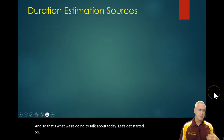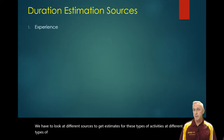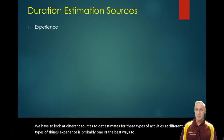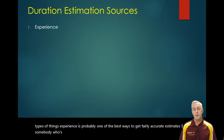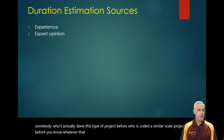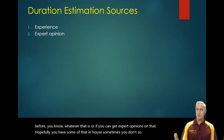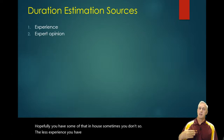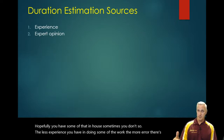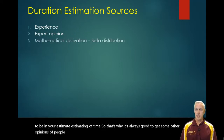We have to look at different sources to get estimates for these types of activities. Experience is probably one of the best ways to get fairly accurate estimates — somebody who's actually done this type of project before, who's coded a similar scale project before, or if you can get expert opinions. The less experience you have doing the work, the more error there's probably going to be in your estimate of time. So it's always good to get opinions from people who've been there and done that on how long it's going to take.